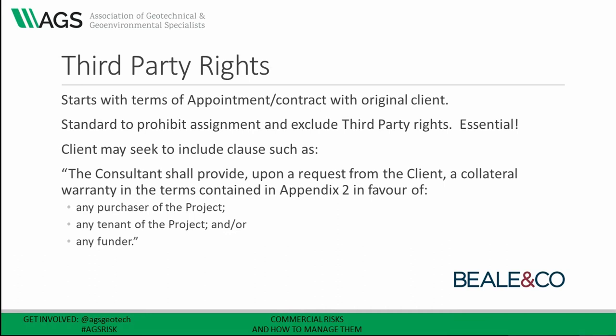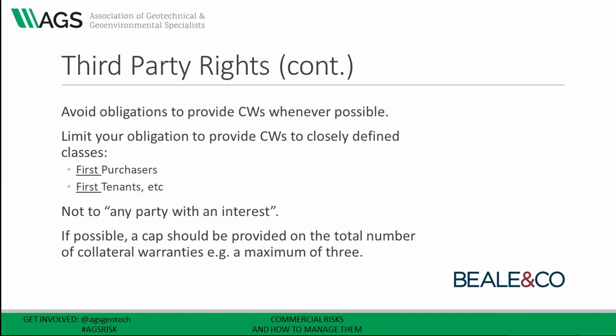Your client will usually insert a requirement in your appointment to provide collateral warranties to certain parties — for example, a clause stating 'The consultant shall provide, upon request, a collateral warranty in favour of a new purchaser, a new tenant or a new funder.' We've seen them drafted wider too, such as to any party with an interest in the project. We would always advise you to avoid providing collateral warranties wherever possible, but if that's not possible, limit your obligation to a closely defined group — so instead of any purchaser it would be the first purchaser, and cap the total number of collateral warranties you are obliged to grant to a maximum of three.